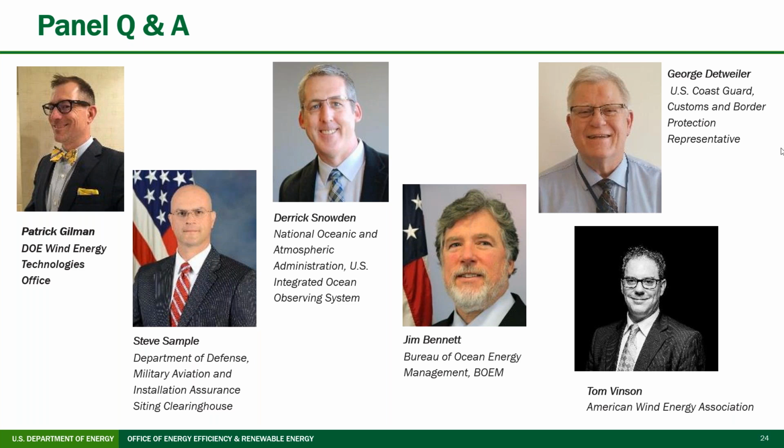We're not going to be able to answer all of the questions, but by the time we go through the process of identifying a wind energy area, eliminating areas that are clearly in hard conflict with other uses of the ocean, and then moving to a lease sale area potential there, hopefully that process has identified, insofar as we know, all of the issues that we can put forward at that time.